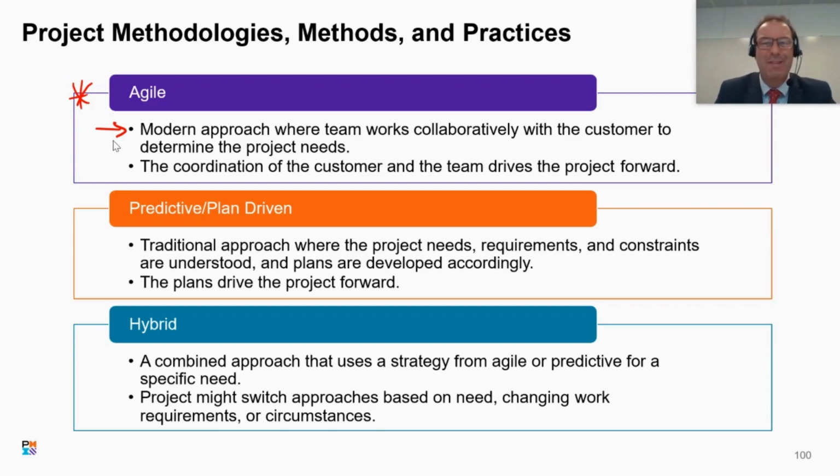So what's the difference then of when comparing it to waterfall? What are the core differences? That in an Agile environment, time, cost, and quality are fixed. In other words, there's no more time, there's no more money, and the quality is fixed from the onset, from very early on in the feasibility of the actual project itself. Whoa. Now, that is radically different from waterfall.